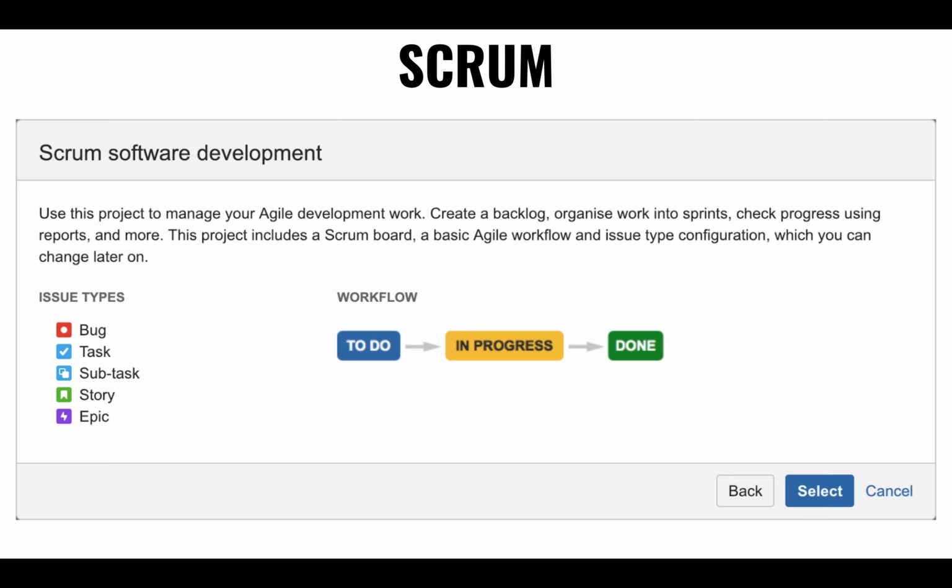It's the default, although it can be configured on how the issues, different tasks, and different stories flow throughout the sprint. At the beginning of the sprint, folks go in the backlog and find all the tasks and load the sprint, and everything is in the to-do at the beginning of the sprint. As the developers work on a task, they drag it, or they can edit it from within the ticket, and it gets moved into a different state that you're actually working on it.